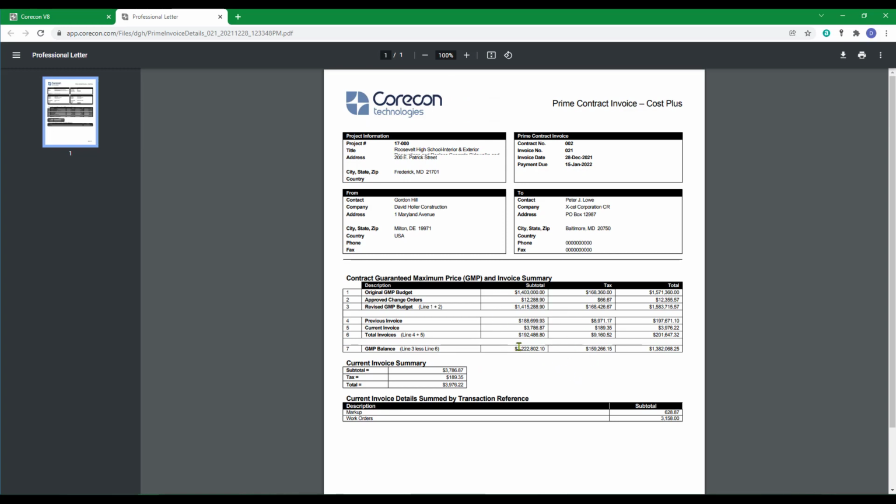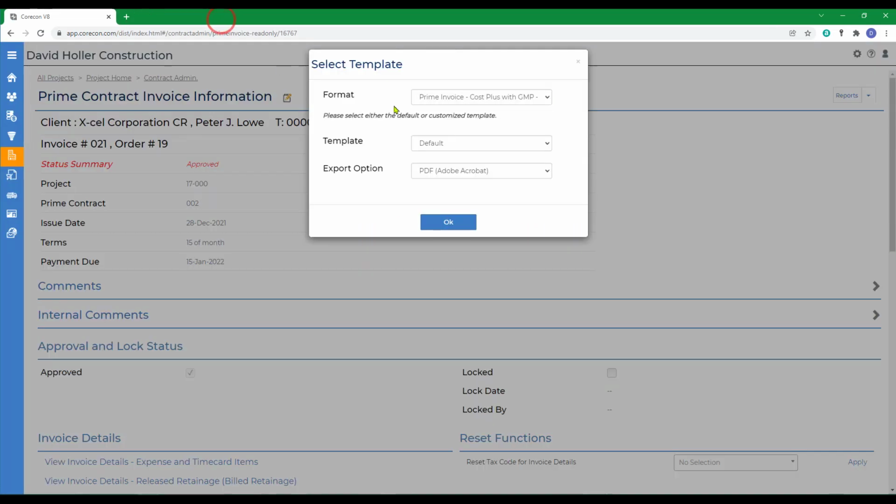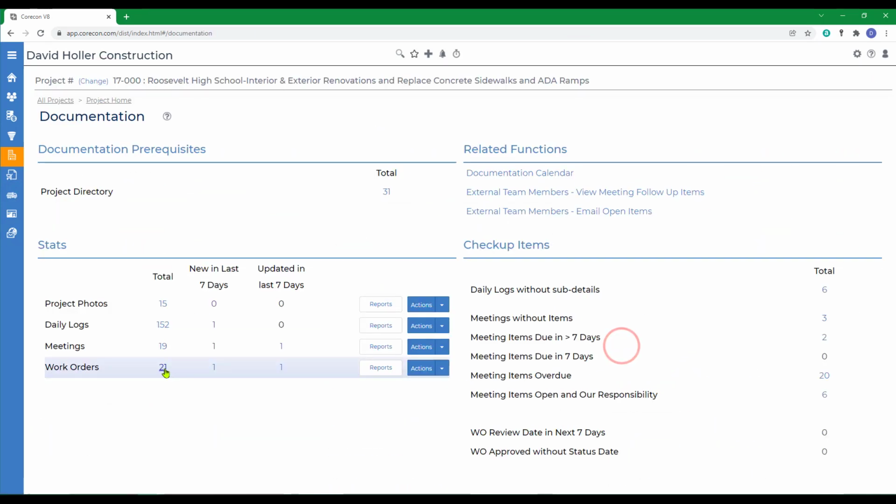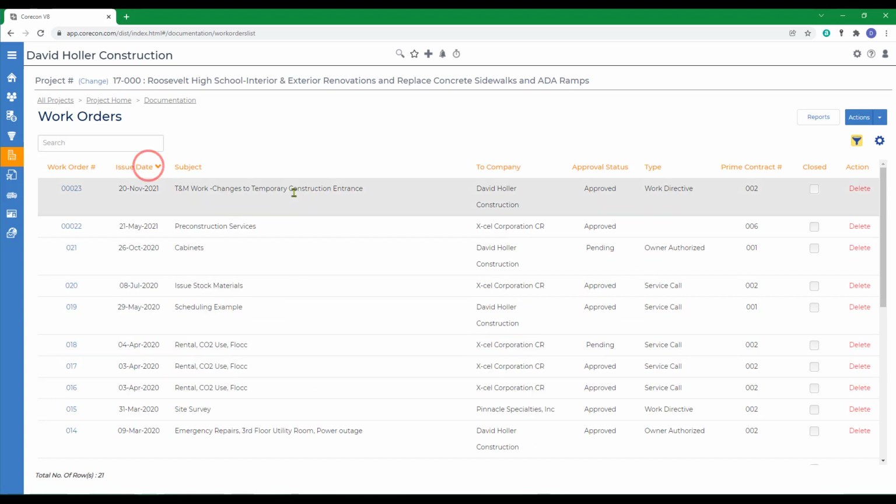There are quite a few options in printing work orders as prime invoices. We just selected one. Remember that once a work order has been resolved and you've decided where that ends up, make sure to come back and close that work order so it won't be used again. It'll still remain on the logs and in the detail. It'll just not be available to import into a different transaction type.